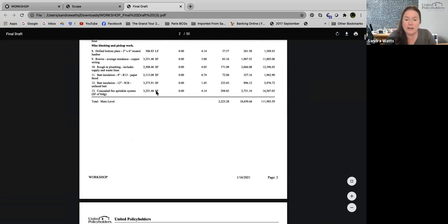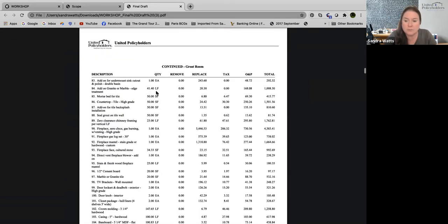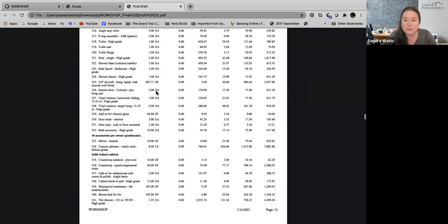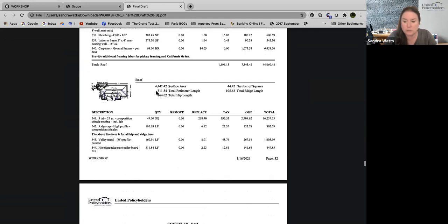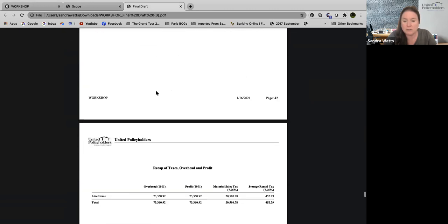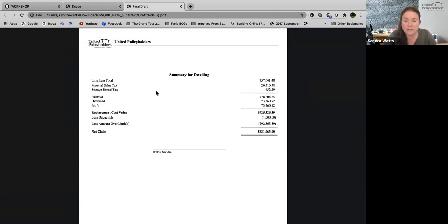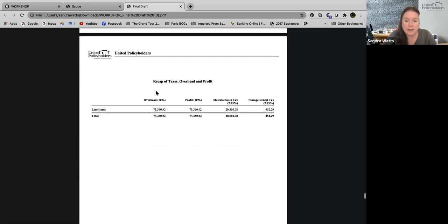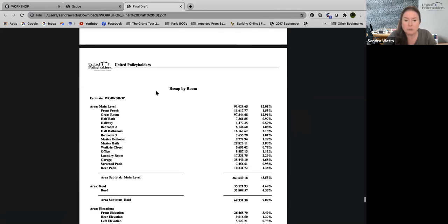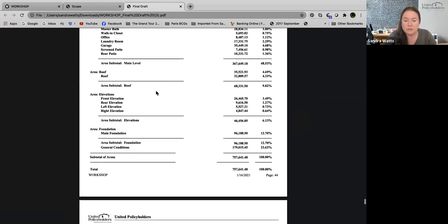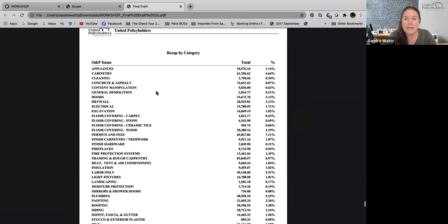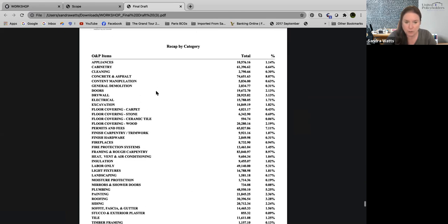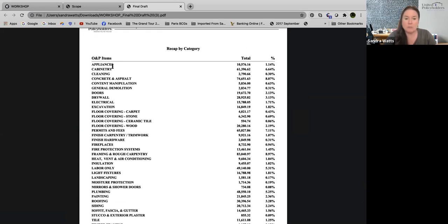So what I want to show you is, this is one thing you want to ask for. It's at the end here. And this is going to help you farther down the road. It's going to help your contractor when it's time to do an estimate. Say you get everything fixed and this estimate now matches your home you lost. Now this is a recap by room. You need to ask them for what's called a recap by category. Okay. And what this shows is how much is allotted to each trade. And this is really helpful.